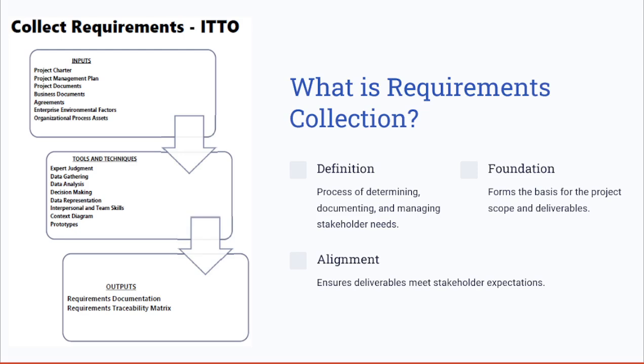Also, the requirements traceability matrix, which includes and assigns each of the requirements to the stakeholder with its urgency reference. You can think of the requirements traceability matrix as a way to understand who requested what.